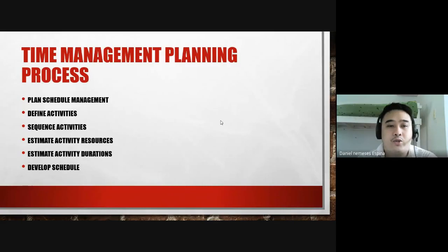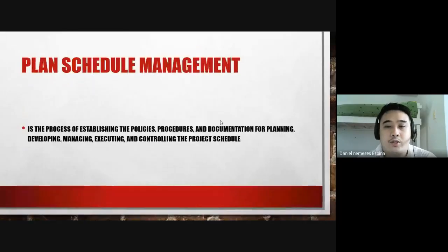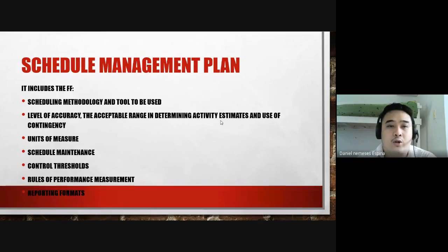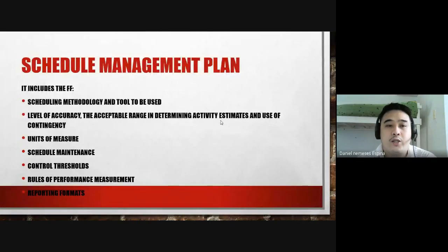Plan schedule management is the process of establishing the policies, procedures, and documentation for planning, developing, managing, executing, and controlling the project schedule. The schedule management plan contains: the scheduling methodology and tool to be used; the level of accuracy — the acceptable range in determining activity estimates and use of contingency; units of measure; schedule maintenance; control thresholds; rules of performance measurement; and the reporting format used.